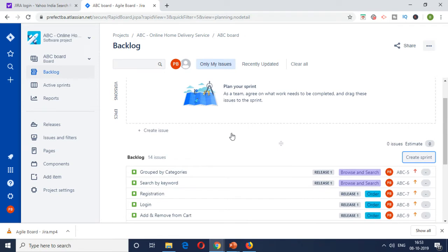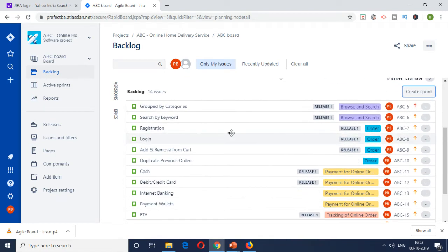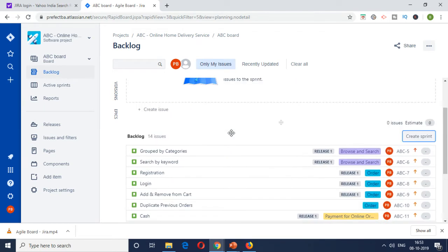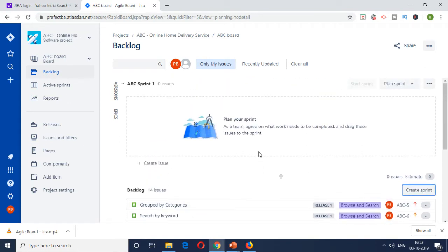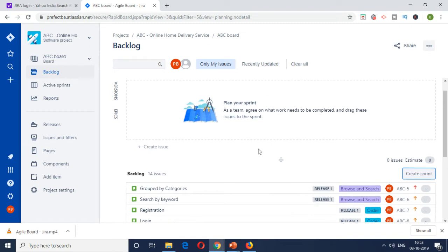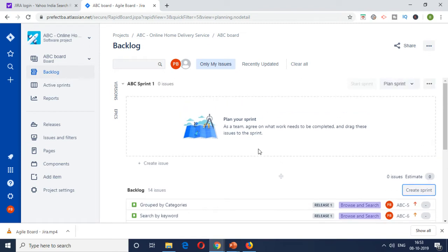And they will be discussing among these items, which are tagged for release one, which would be can be taken up for this particular sprint. So it depends on the capacity of the team. There would be an estimation exercise done. And then based on that, they would be able to be taken into a sprint.